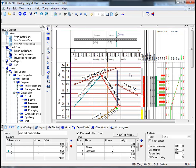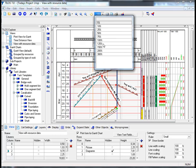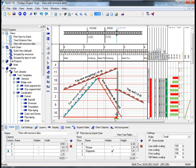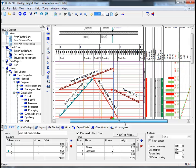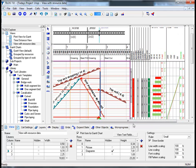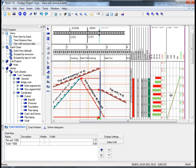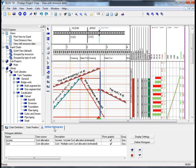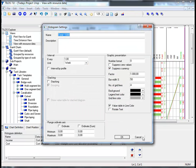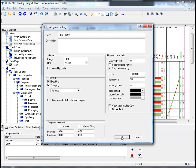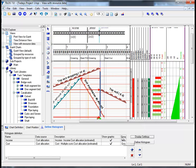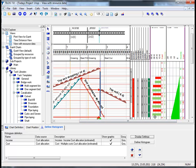Before I proceed to show you the difference between cost and income, I am just going to increase the view of the page slightly. If I click on the main toolbar and select 125%, this is more physically and graphically appealing. By clicking the diagram, or the histogram as we call them in Tylos, in the details toolbar, clicking on the define histogram view tab, and then selecting display settings, I can tick the box next to stacking and grouping. By confirming OK, I can now see that during the first weeks of our project, we have had more income in green than we have incurred cost displayed in red.